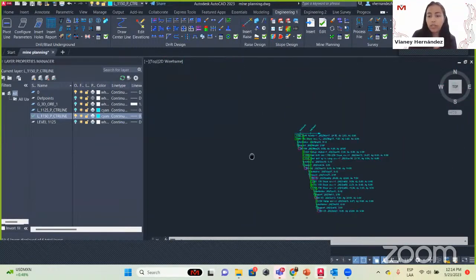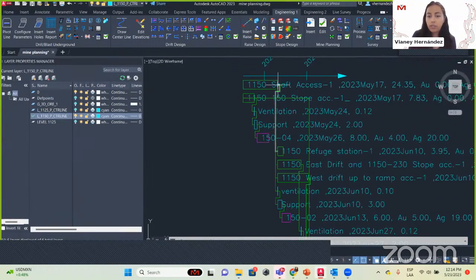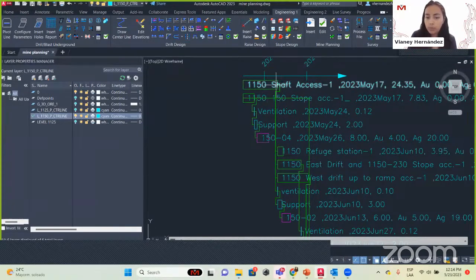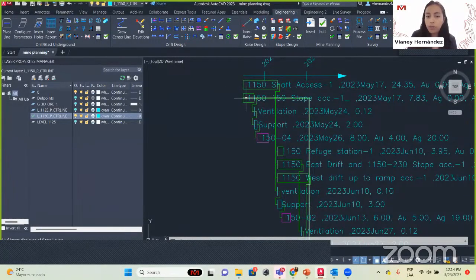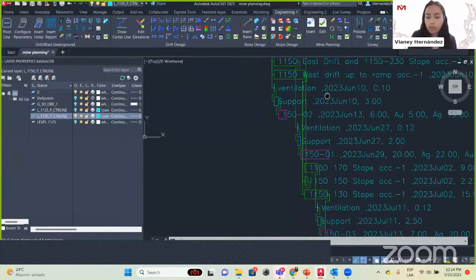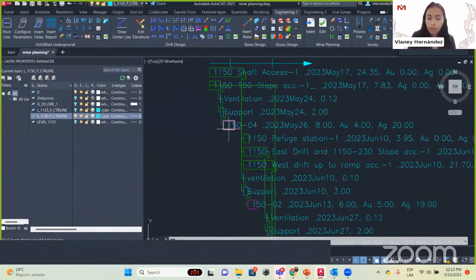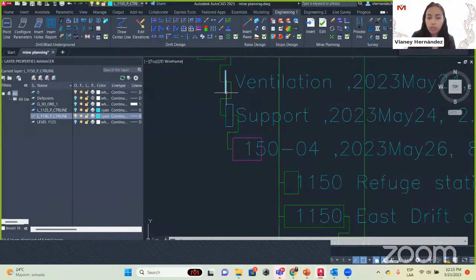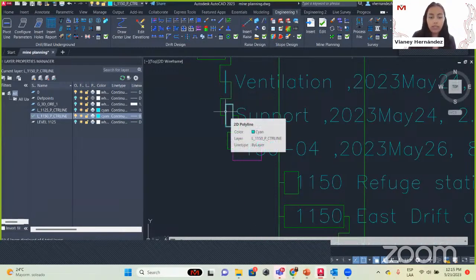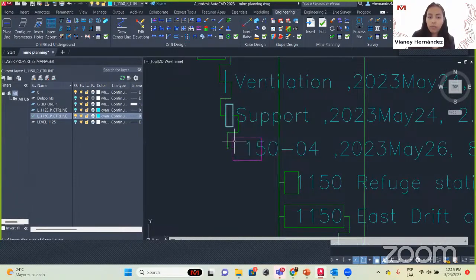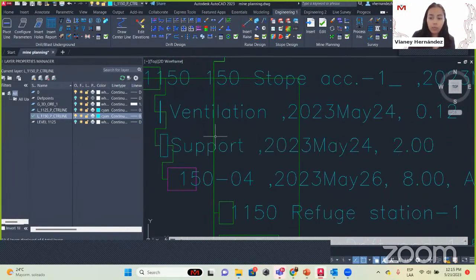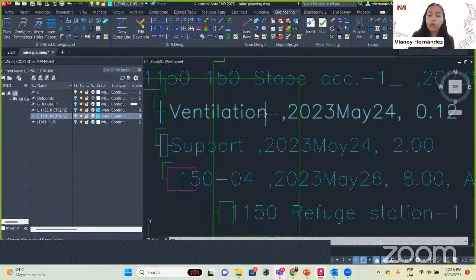The green bars are our drifts, and as you can see they are connected because we selected predecessors — after we are done with one, we continue with the next. Some bars are very small because the task takes less than one day. The blue ones are tasks. We see the same information: the name of our task, the date, and other details.